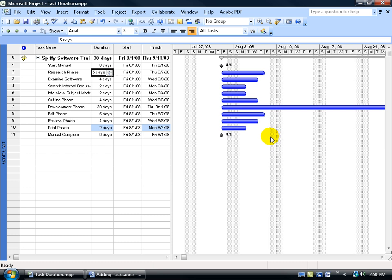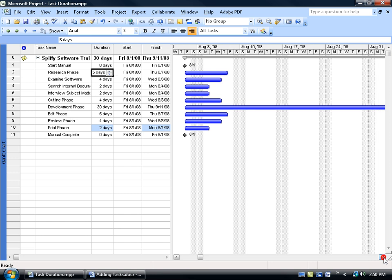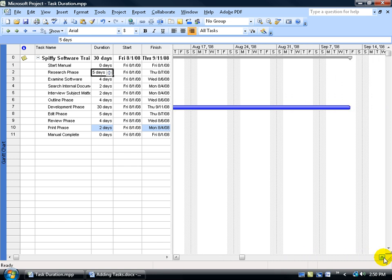Over in the Gantt chart, you can see that the summary task is also keeping track of the longest task. In fact, if you can scroll over quite a ways here, you can see there's the ending point. To complete the project, we've got to complete this longest task here.